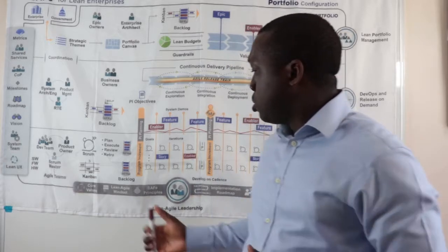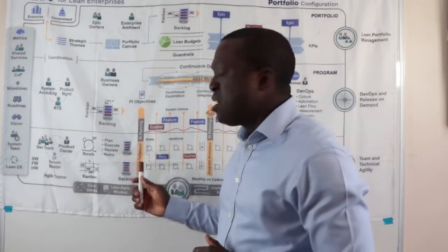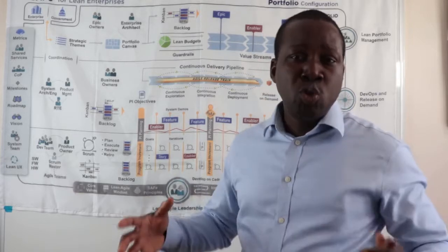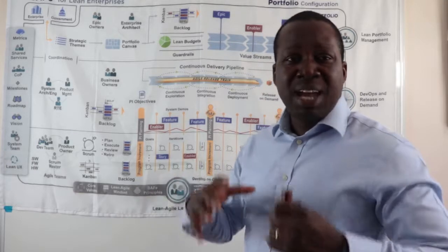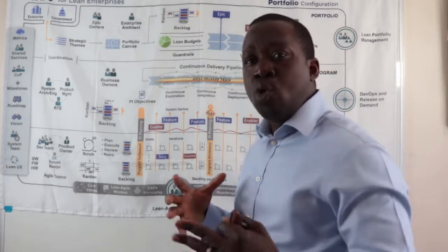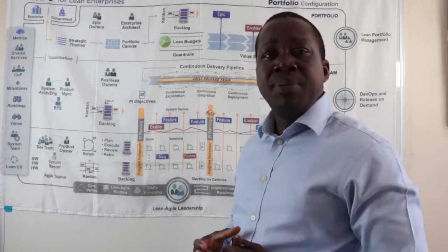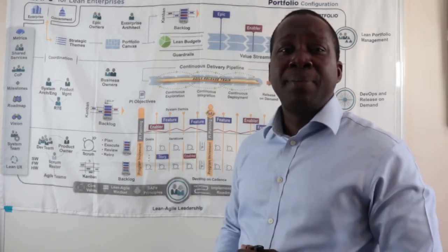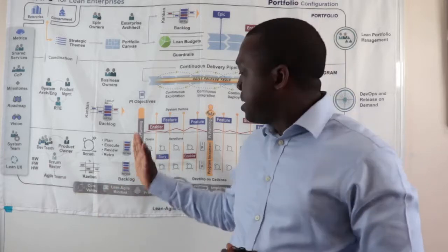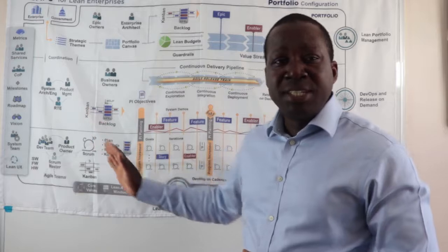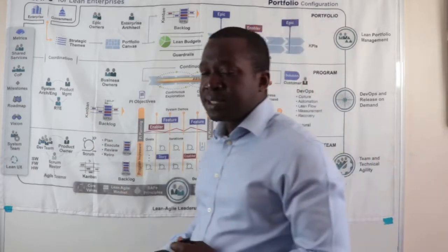We are also considering our program increment week. In our program increment week, it's a 2-week period where we've got time for innovation and then time for planning before we go into our 2-day planning. So we have planning readiness before we go into our 2-day PI planning. And these are events that are coordinated by the release train engineer with support from the Scrum Masters.